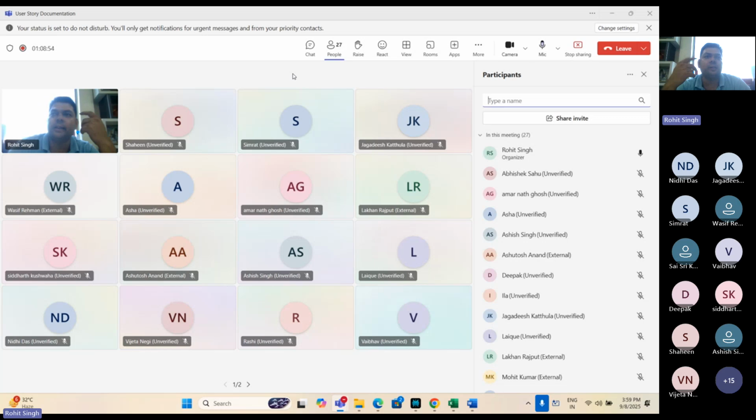So client will tell us, okay, change this for vendor, change this for logistic, change this for payment, but it is good to go for the customer, guest and registered user. So we will write it down and create the user story accordingly. Once done, we send it to the client, get the approval, then we start working on the grooming session and then we start the sprint for design, development, testing, deployment.